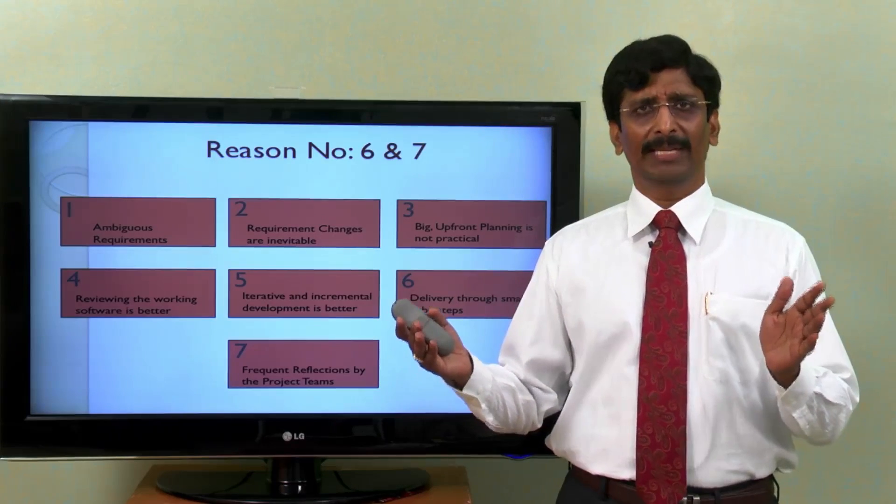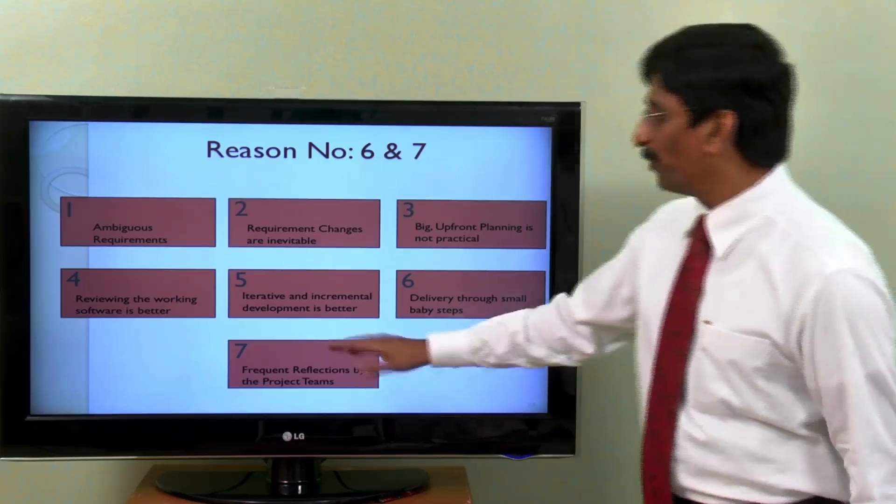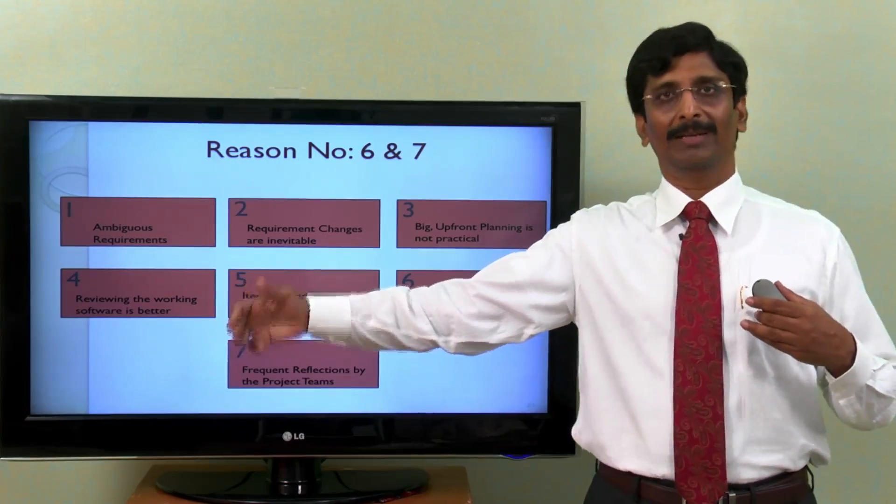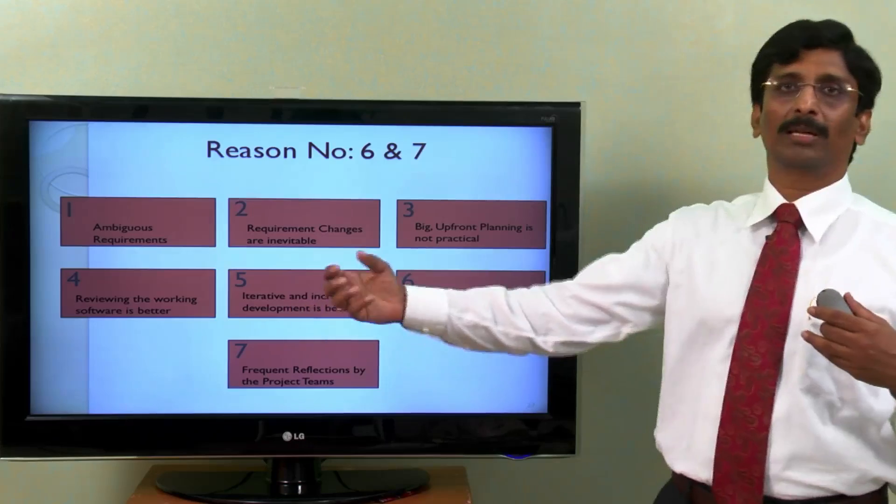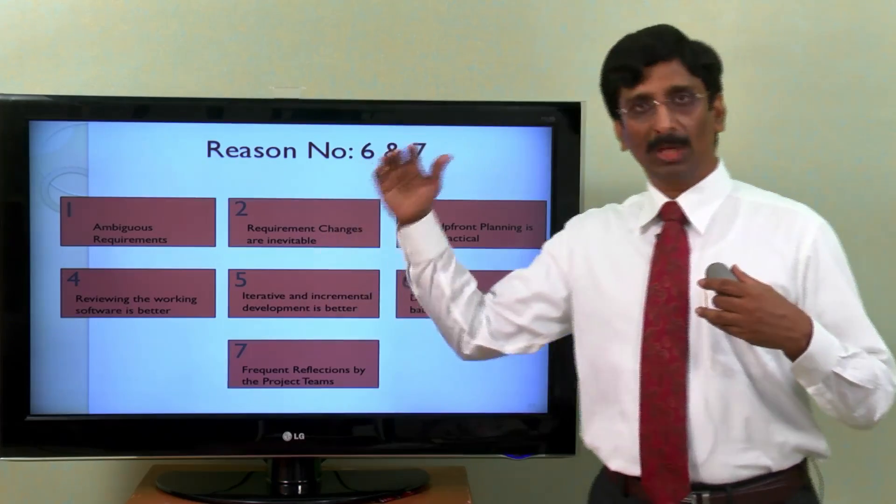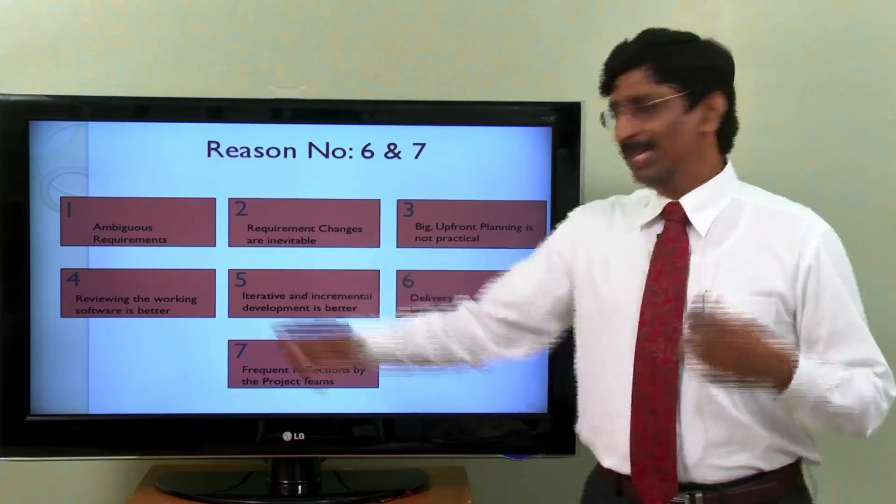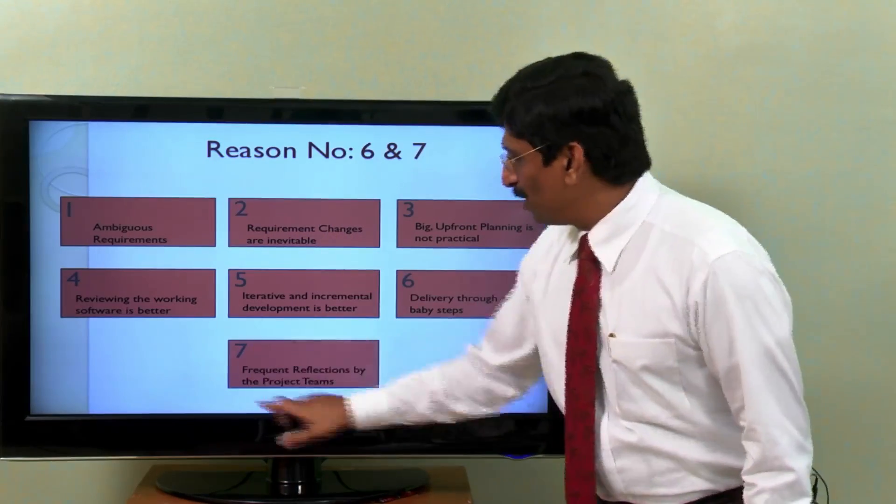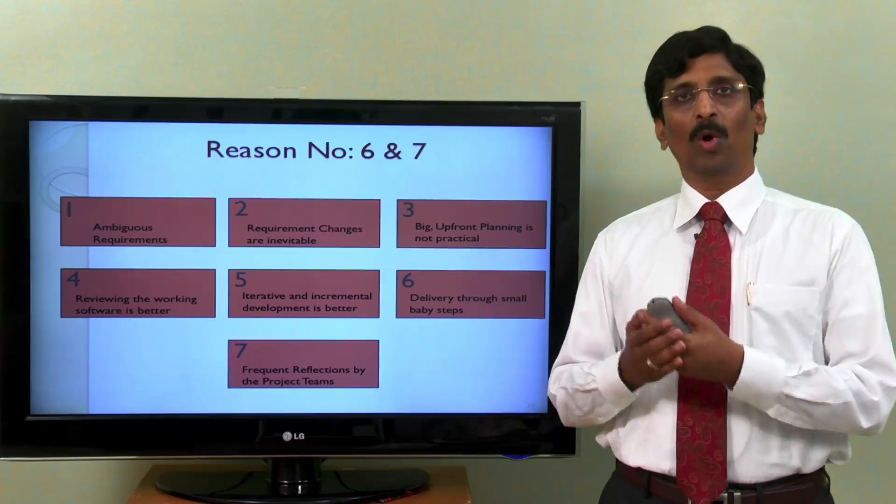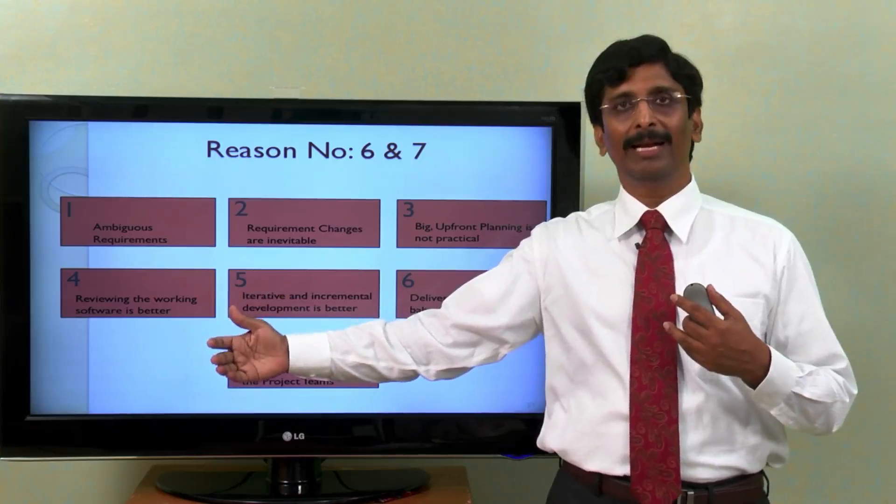What do we do right now in the traditional software development life cycle? We do some reflections that is mostly by the end of the development life cycle. End of the project, you do a project retrospection meeting, or some projects call this as a project closure meeting or in some other name. So that is too late. Even if you learn a lot of new things or if you want to change a lot of things, it is already too late. It is already end of the project.